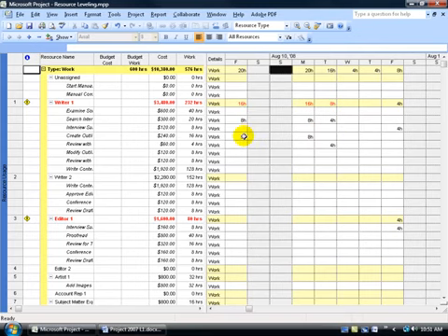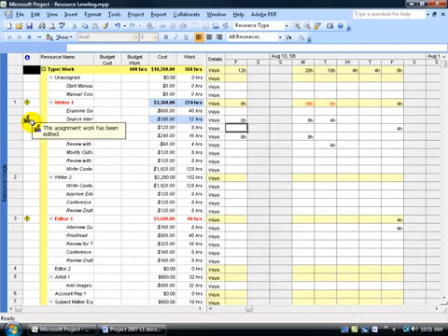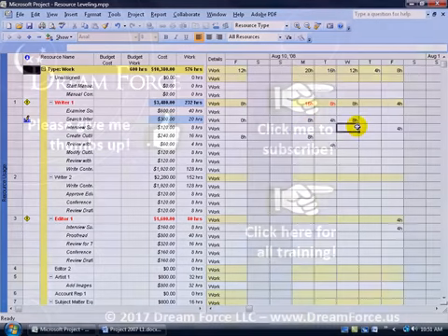And as you recall, when we change it, for example, to 0, hit enter, notice here's the contour here. When you hover over it, it says this assignment has been edited. And then we come back here and we say, well, let's just delay it back to 8 here, hit enter. And so the task is still X amount of days long, including the first day here, which is 0 hours, but the contour is going to say, let's not work it all up front, let's work it towards the back of the duration of the task.